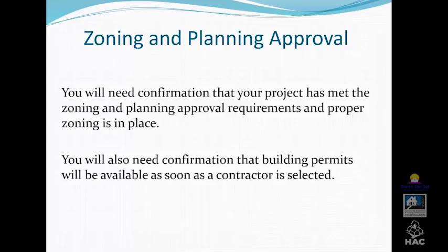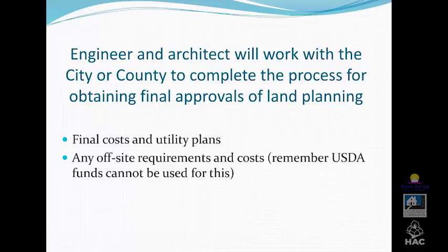What this is, it is an assessment of what are going to be the financial needs of the property for the next 20 years. The cost of this needs assessment can be included in your pre-development cost and reimbursed at loan closing. This is an important document because it will estimate the amount of reserves that are needed from the project.